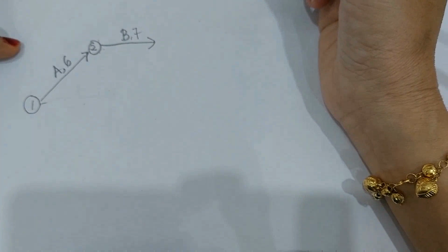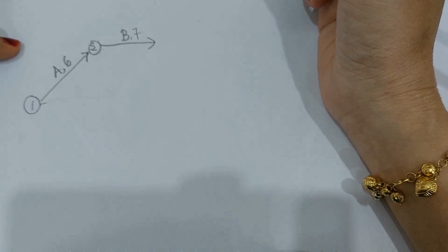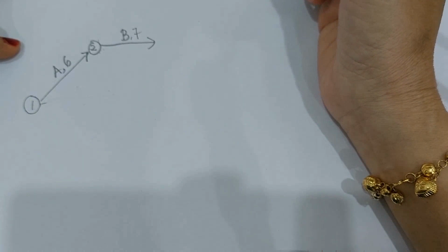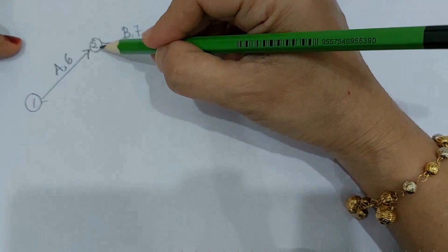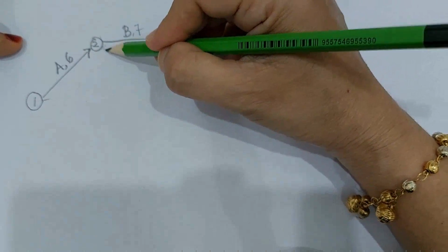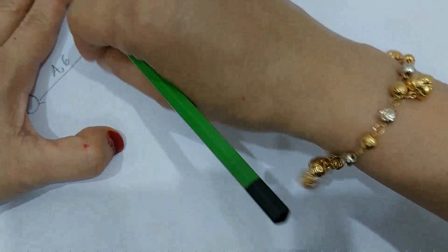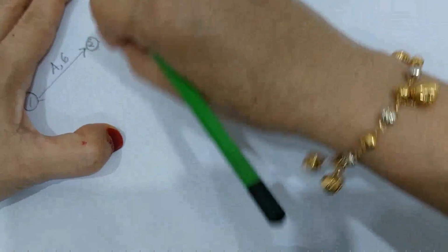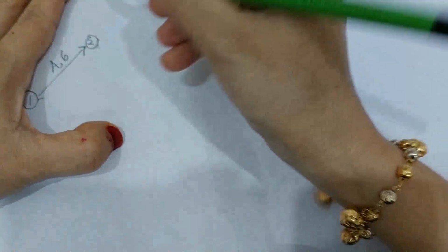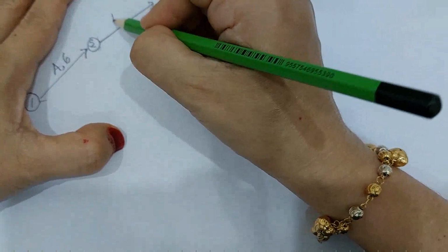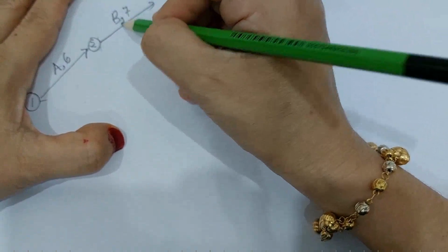Okay, B is done. We go to the next activity, C. C also comes from activity A. A is the predecessor for C, so C will also come from the same place over here. Because of that, I want to erase B and move up the arrow a little bit. So this is your B just now, time is 7.